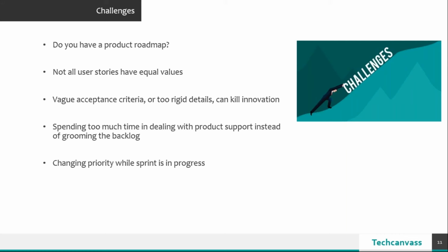When the production support team is probably not very clear about answering the queries to the customers, because they are not very sure what exactly the value add or the feature is going to be, or how it's going to benefit the end users. And of course your development team is trying to adhere to the product roadmap. So to avoid that, whenever you do backlog grooming, or a backlog refinement meeting, try and get as many people as possible, so that everybody is on the same page.